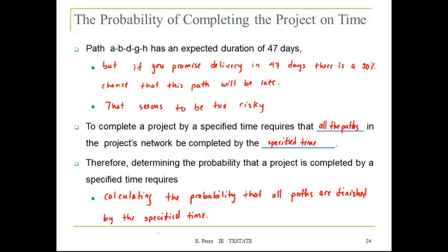We got a good fit for the data, and the software is telling you that the data is following a beta distribution. So we know the task durations are going to follow the beta. So we can use the expected value of the beta to find the estimate duration for each one of the tasks. So that's what we have done so far.